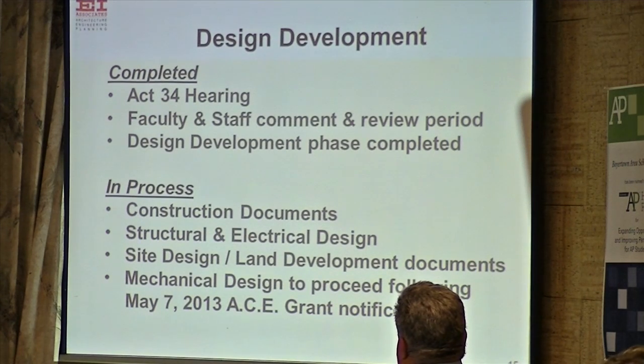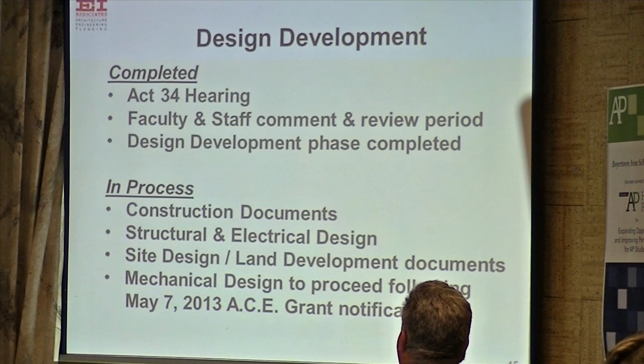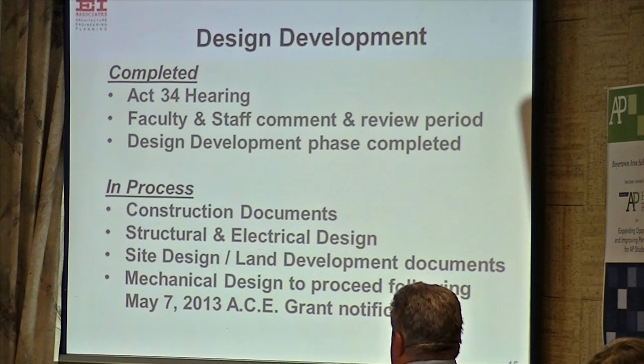So we did the design development, and here's where we are. We completed the Act 34 hearing. We have a faculty and staff comment review period. We have completed that in the design development phase, and all the interior rooms have been laid out. We're in the process of developing construction documents, which are the actual bid documents. We're working on the structural and electrical design and the site plan development. We met with the municipalities.